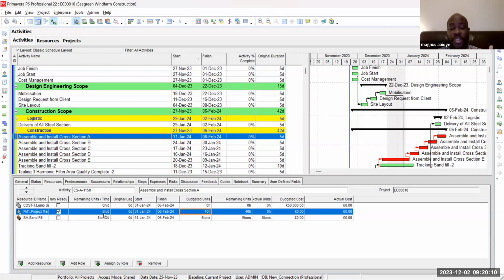Using ordinary logic, if someone is meant to work 8 hours a day, which are the standard hours agreed with HR or the contract hours, it means that logically for 5 days he cannot work more than 40 hours. If he works more than 40 hours, then he's not working 8 hours a day.